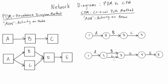The problem is this violates the rule of each activity having a unique IJ number, because B's IJ number would be 2-3 and C's IJ number would also be 2-3. The way we handle this is by introducing another node and, most importantly, the use of a dummy variable. We erase B from its original position. Activity A sits on an arrow between nodes 1 and 2 — node 2 represents the point where A is done and both B and C can start. Activity C goes from node 2 to the point in time where D starts.